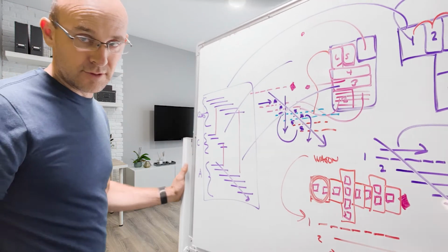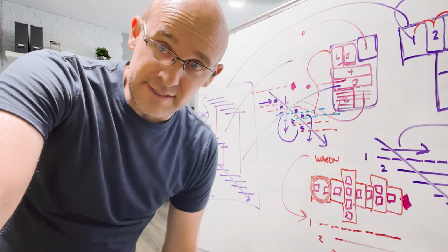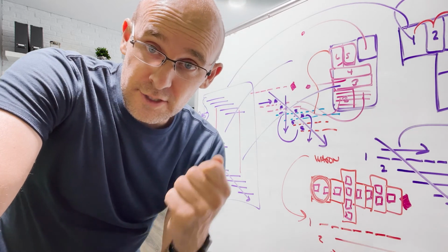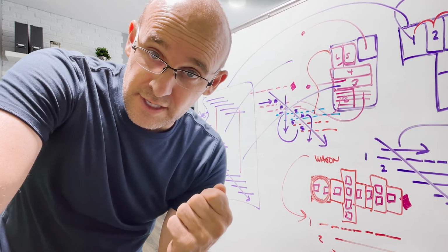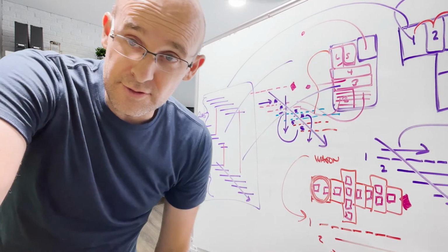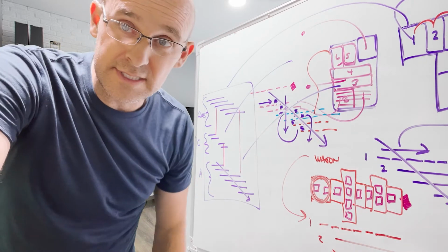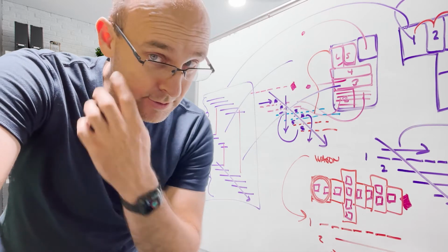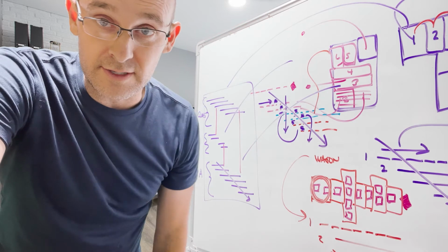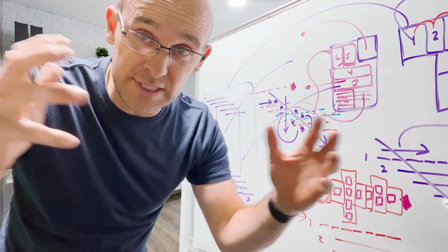Let me just say one more thing before we're done here. We want to prevent non-inevitable variation so that we can deal with inevitable variation. So if you do say, hey, I want to deal with the auditorium strictly with last planner, and I don't want to break it into the areas, and I don't want to see trade flow, which I don't know why we would do that, but if you said, hey, I'm just doing true last planner without takt here, be careful not to do it all at once, because then you're increasing work in process.